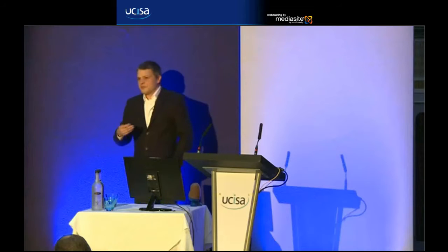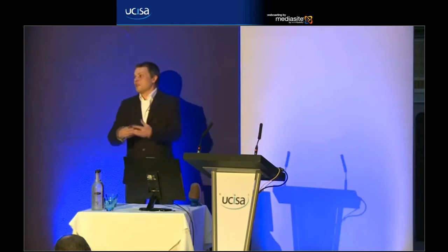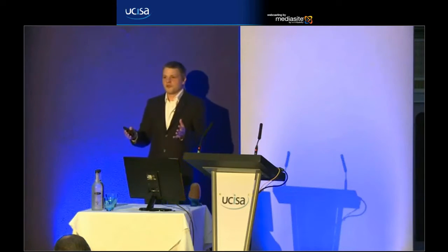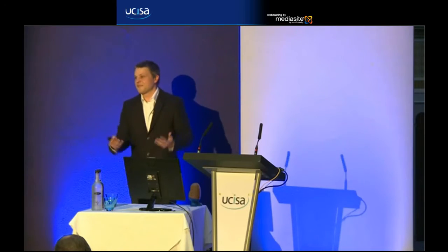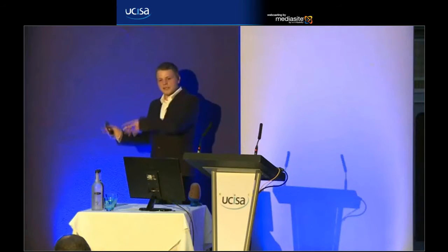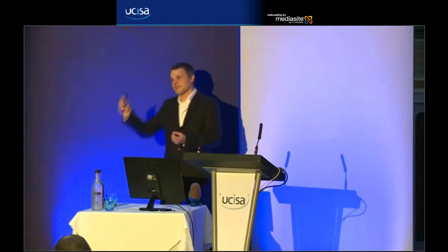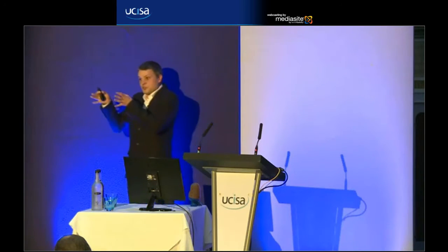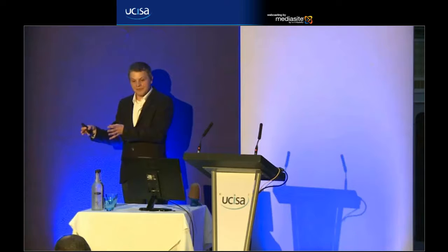Now, in terms of developing, we might have developed, for example, a login page. And if that's all we've done at the moment, we're not going to obviously release that to the users if all they can do is log in and nothing else happens. But when we're working through these iterations, we'll repeat that sprint and we'll take more stories from the backlog, break that down into tasks, we'll work on it again, and we'll produce a production-ready element at the end of it.